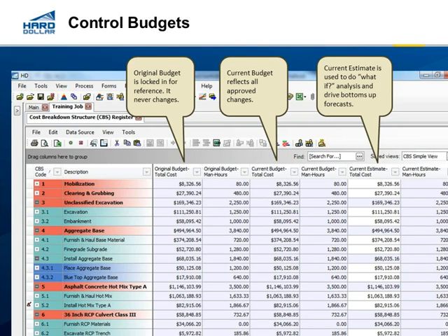That will impact our current estimate, and that will allow us to compare what's happening. This duration change affected my current estimate. My excavation item might now be $200,000, and how does $200,000 compare to $111,000? Well, that's a $90,000 difference. Not shown on the screen, but that's a quick scenario.